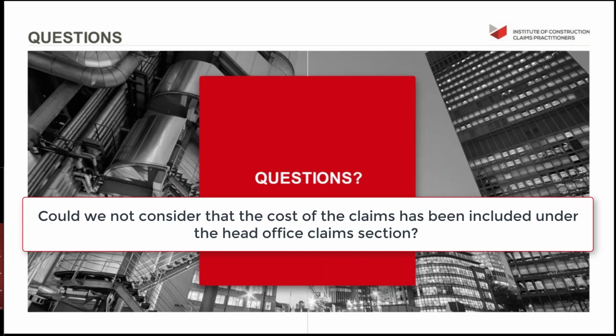If you're entitled to an extension of time, I'm willing to pay for their costs for the period of prolongation where they're carrying out their regular duties, but you've got a contractual obligation to comply with the requirement for submitting full claim particulars. So I think where you include them in the claim cost is possibly not as important as the way you try and justify their inclusion.